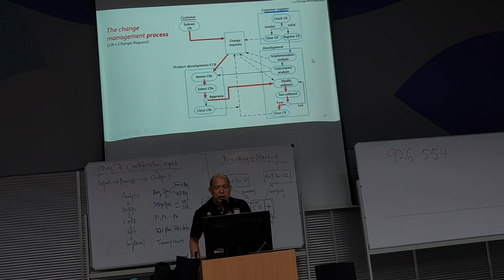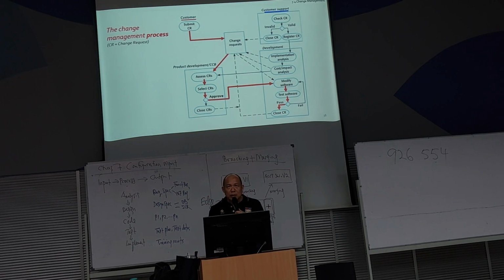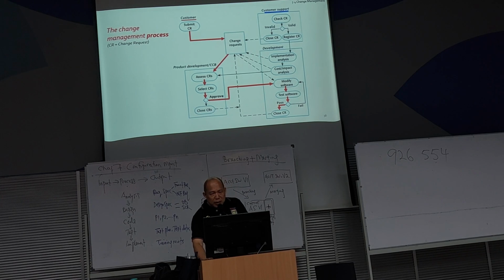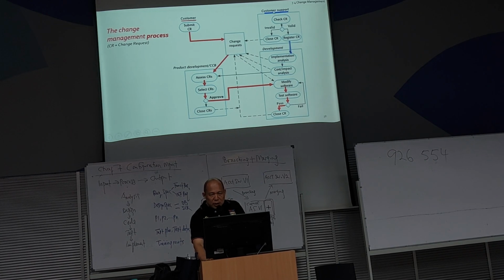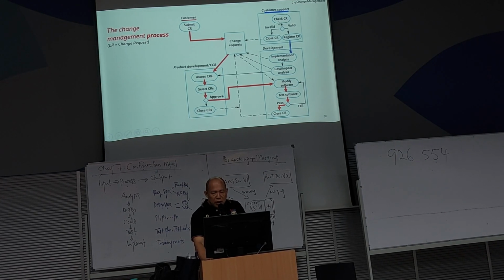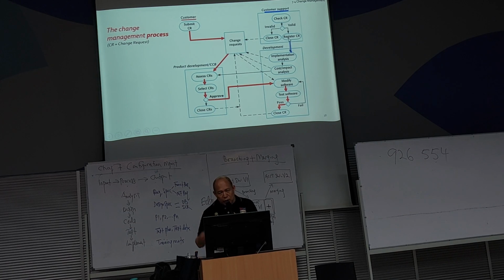So change requests can also come from the customer support team. The customer support team receives change requests, checks the change request, and if the change request is valid, registers it. Record the change request you receive.